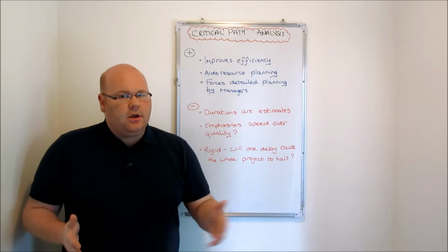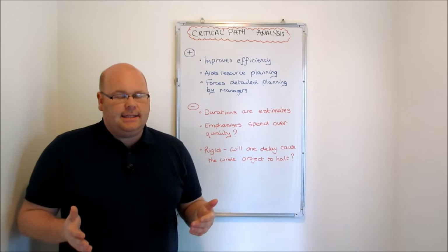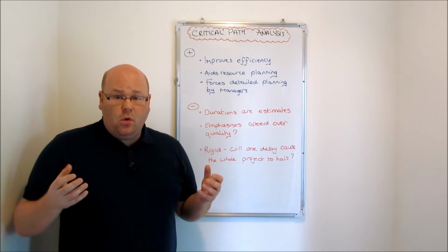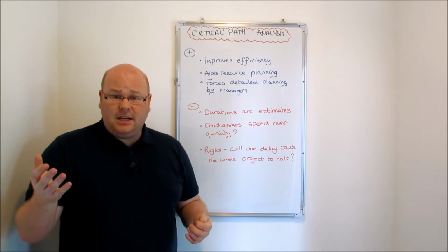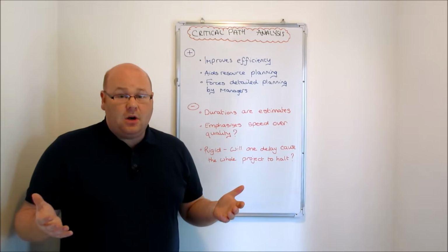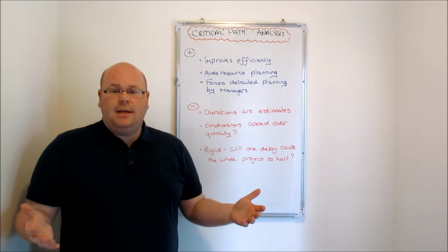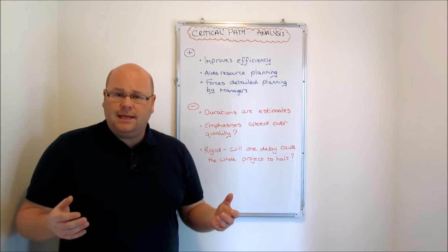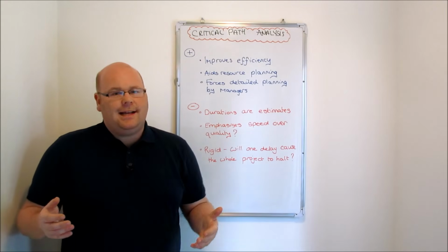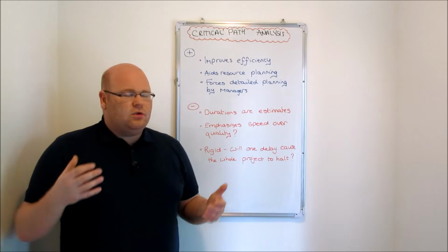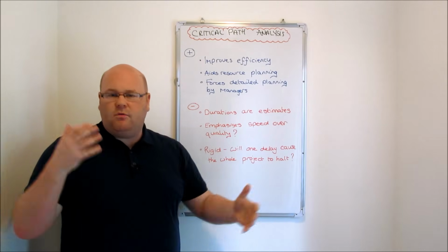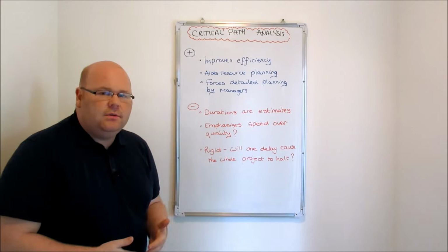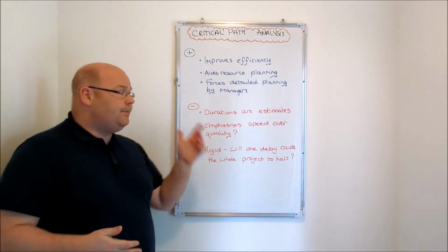But if there are delays earlier in some of the activity chains, it might mean that things we've got booked or scheduled can't actually occur, but we might still have to bear the costs of them because it's too late to cancel them. And it might mean that the project ends up grinding to a halt temporarily while we catch up with activities that have overrun, and then we have to rebook consultants, and we have to re-get hold of stock that maybe we've cancelled, and it can lead to difficulties in the organisation.